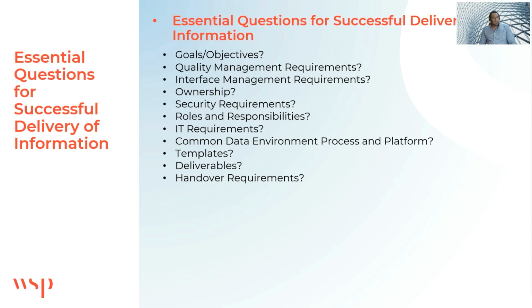What are the deliverables required to fit all the purposes or all the goals and objectives of the project? And who will deliver it, when it will be delivered, how it will be approved, and all the questions related to the deliverables. What are the handover requirements? So if these deliverables will be handed over to another consultant or to an operator, what will be the process of this handover? How you will verify the information, and how you will ensure that the new party receives the information and can proceed with it.